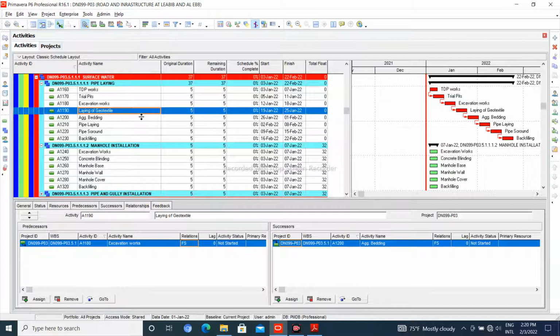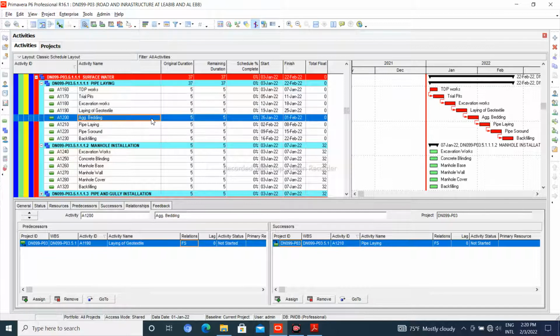So here, for instance, because our duration is still not yet fixed, we're going to fix this one, I'm going to tell you later. Because 5 days is from Primavera, it's a setting from the software. So in the future we are going to calculate the exact requirements based on the quantity with the productivity rates and everything. After that, we will put the accurate duration for that.